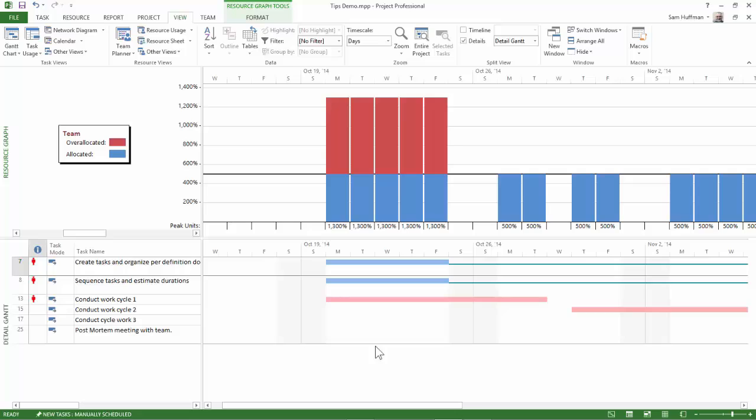So do nothing. Second, swap out the affected resource with someone that does have some availability in the time period. Or you could delay tasks until the resource is available. You can see here that I can't delay my red task, that's this one I'm pointing to, but I can delay the first two that we see in the time period. And if I delay them beyond, we'll see this red area, this overallocation, shift to the right, and as it does so, hopefully we'll start to see that amount just reduce. That's the overallocation reducing. Again, think reduce, not necessarily eliminate.